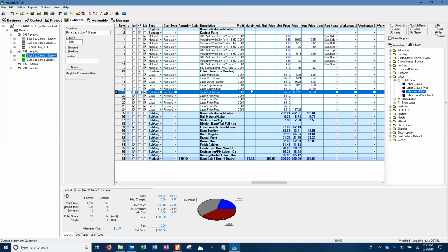So we're padding this, right? We realize, wow, we didn't charge enough. Well, it doesn't change the price. It's still $300. But now our really pretty little yellow profit has turned to a massive red loss because we just added $600+ worth of install, which did not exist before. So our profit has gone down by $516.